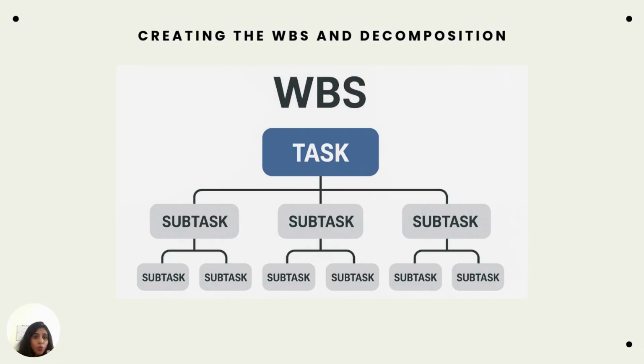Or you don't want to gold plate anything. Everything inside the scope statement must be reflected in the WBS, that is work breakdown structure. Now, if you remember the gold plating, gold plating is nothing but you try to accomplish more than it is asked, just to impress your customers or have your customers delighted. But in project management or PMP exam particularly, we do not gold plate anything. PMP hates the gold plating. So that's the red flag.